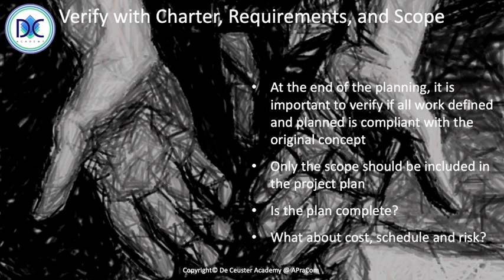We also have to consider cost. What about the cost? Is the cost in compliance with the business case, with the estimations? What are the net present value, internal rate of return, payback time, or other parameters of our return on investment policy? About the schedule, were there limitations? Do we finish, or do we plan to finish, the project on time?